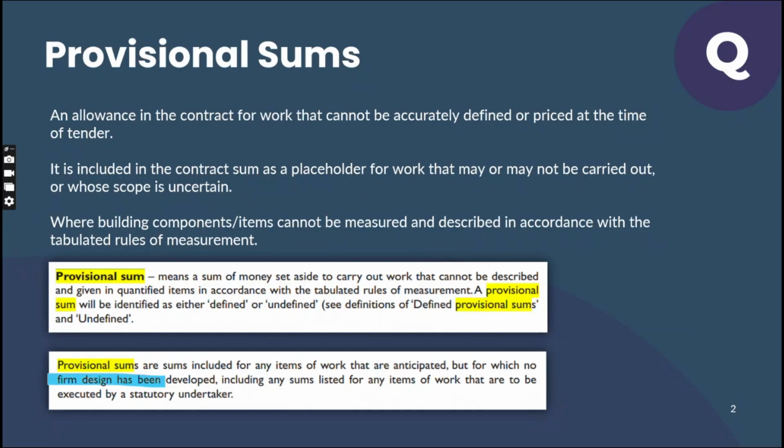Because you will have a cost consultant, he would tell you it's going to cost around 10 million. So you will put the same 10 million or 9 million in the provisional sum bill of quantities. Okay. In the post contract stage, you will negotiate with the ID contractors. You will finalize the specification. You will agree the country of origin.